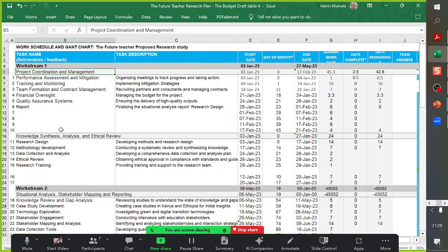Then finally, we look at resources, because all this will attract some kind of resources. For example, a classic resource is that we will need to subscribe to services. So that's a resource. But we need to have the activities locked down, the roles locked down, and then the resources can be assigned. That's a simple way of just breaking it down.